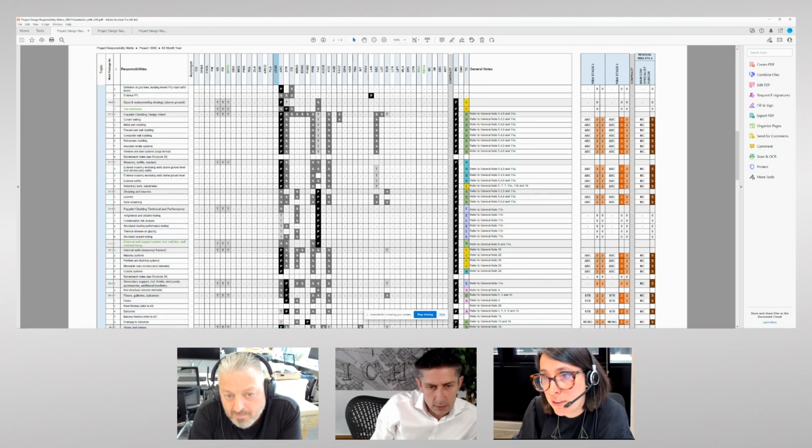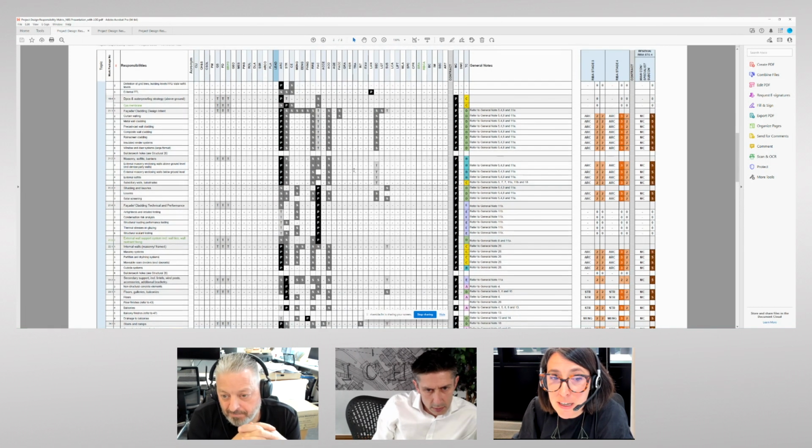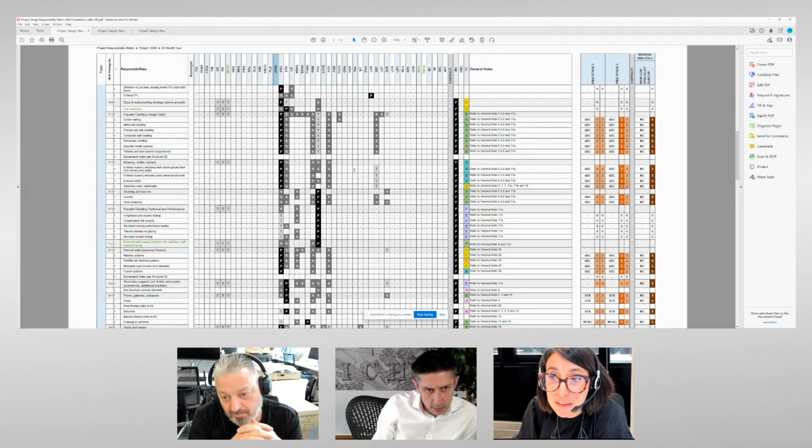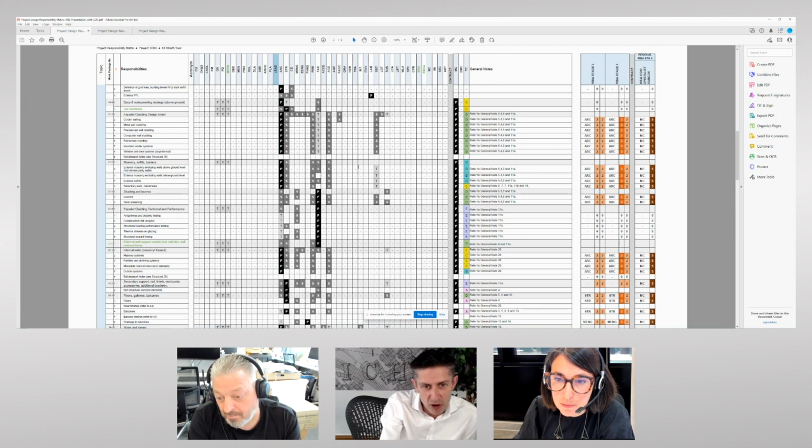And we do find that it looks complicated, it is very detailed, but getting it arranged and in the appointment as early as we possibly can helps to avoid those scope gaps and problems later on in the project. So if you're coming together with a structural engineering firm that's obviously not AHMM, one of the first things you'll do is sit here with this responsibility matrix and just agree where you've got the primary responsibility, where the structural engineering consultant has, and you all know the scope and the rules before you start the design. Exactly.